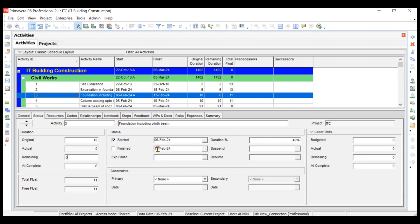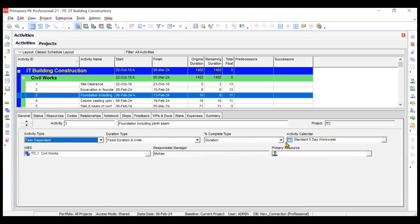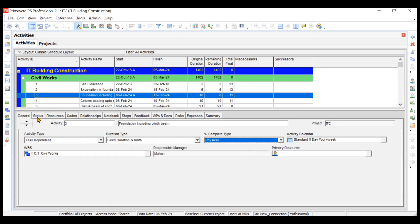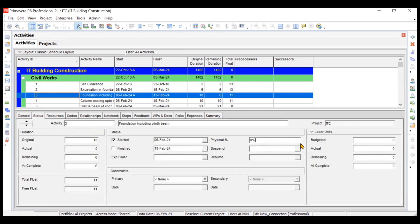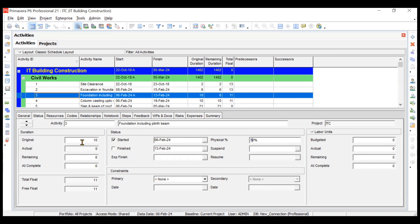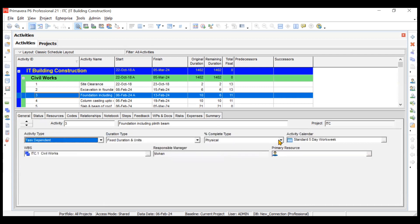If I change the remaining duration to six and press Enter, the percentage becomes 40% by default. Now switching to physical type: going to General, changing to physical, then back to Status and setting percentage to 50% and pressing Enter — the remaining duration does not change at all. Similarly, changing it to 30% still does not affect the remaining or completion duration; you must enter those values manually for physical completion type.